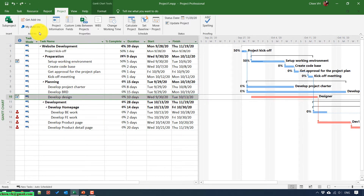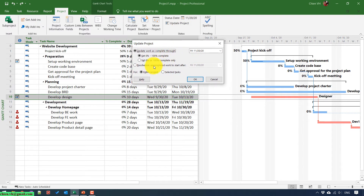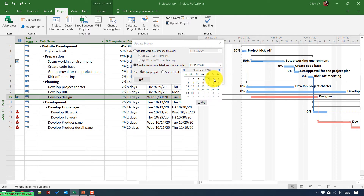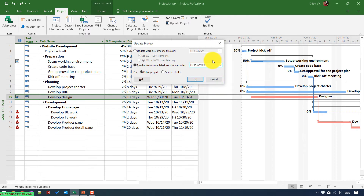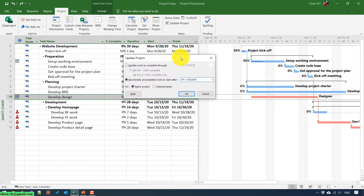In this video, we need to select the second option because we want to reschedule uncompleted work in our project. We need to select a date — for example, November 6th. That means this project will be automatically rescheduled with the new start date being after November 6th. We also have two options here: for the entire project, or for selected tasks.